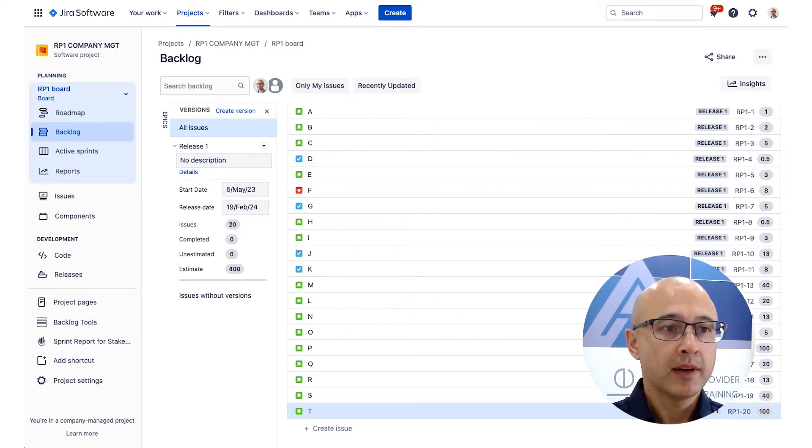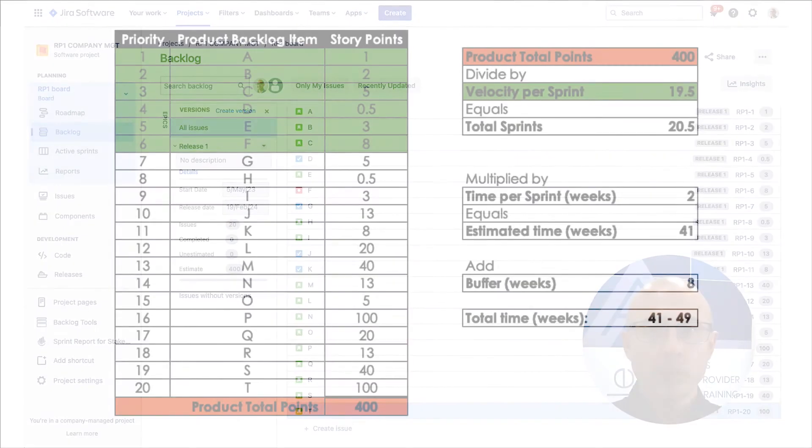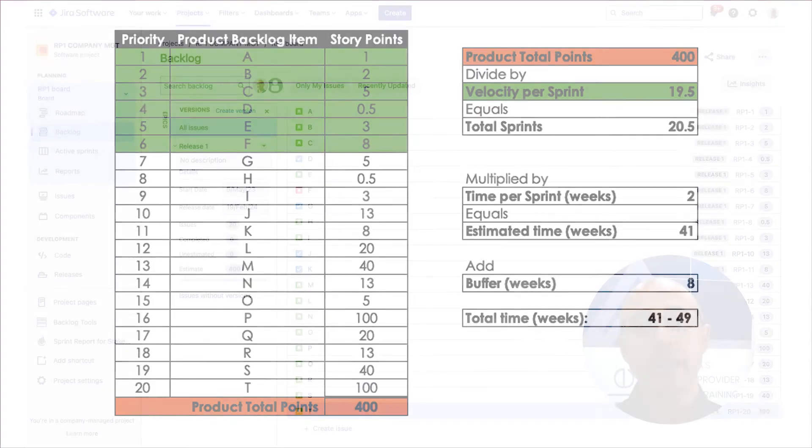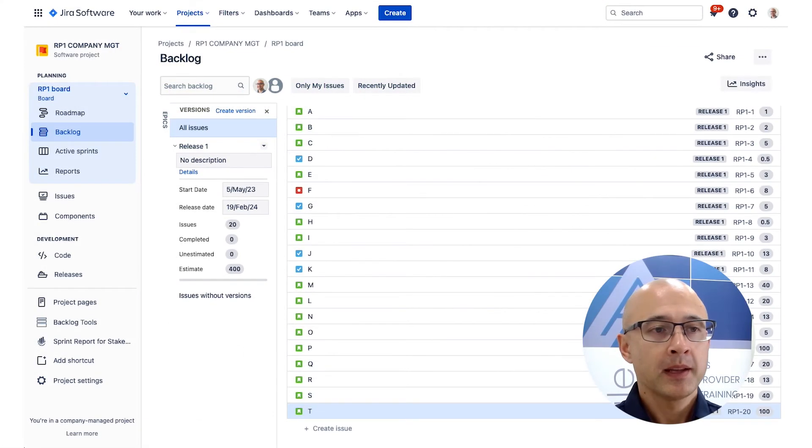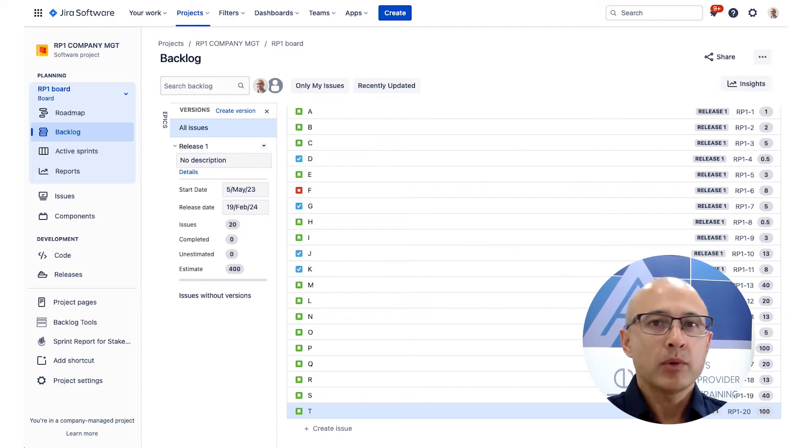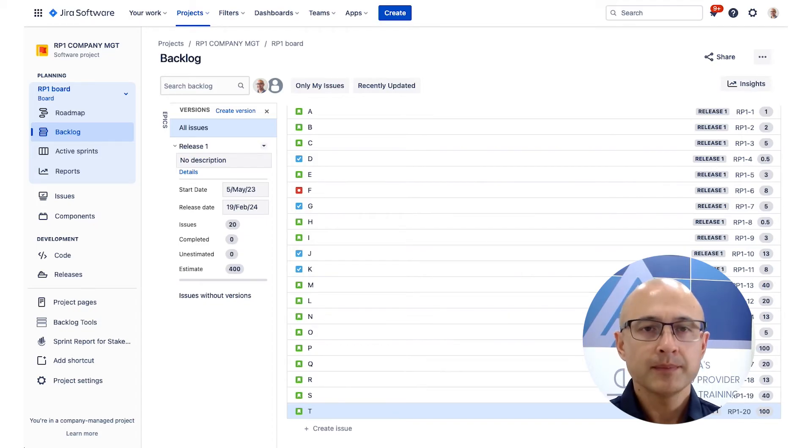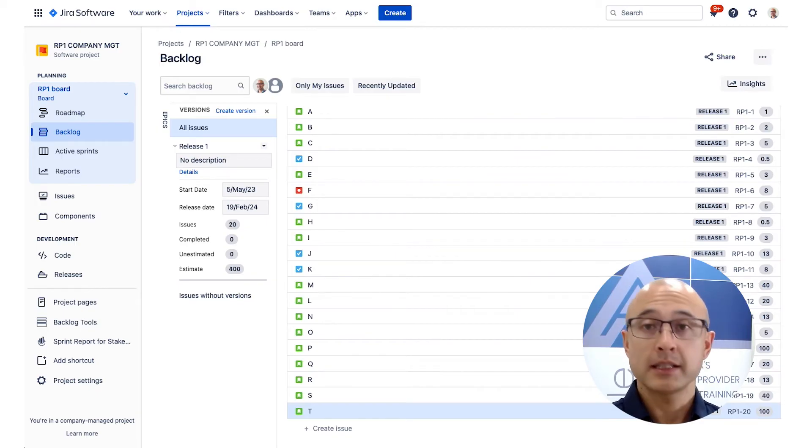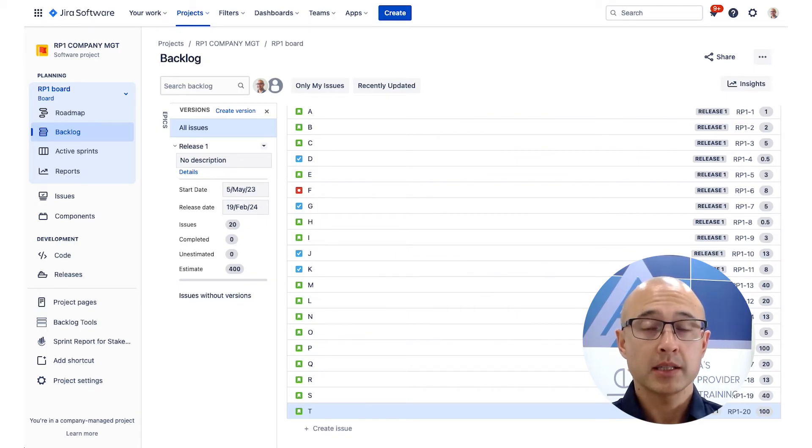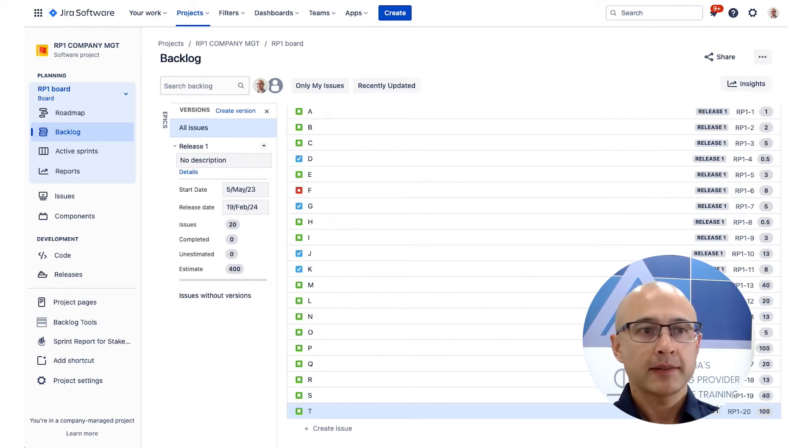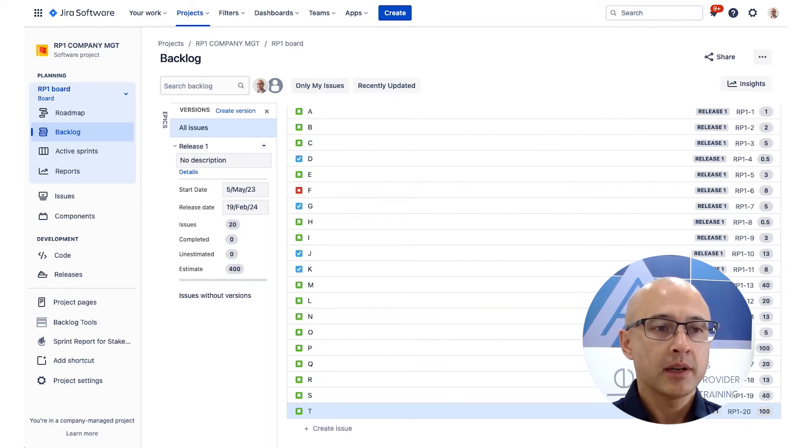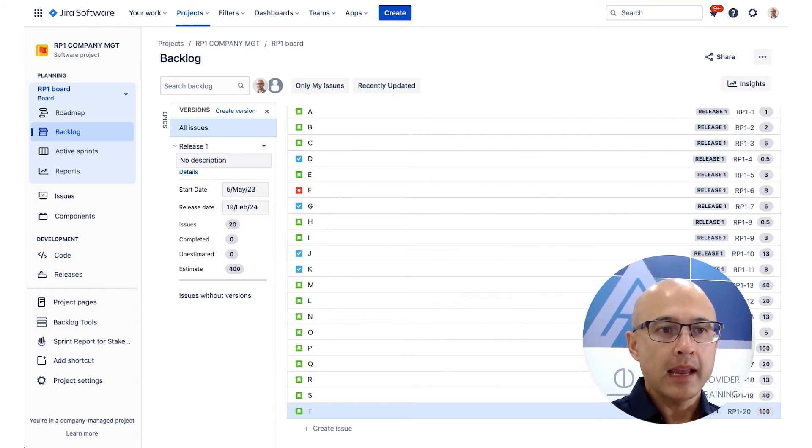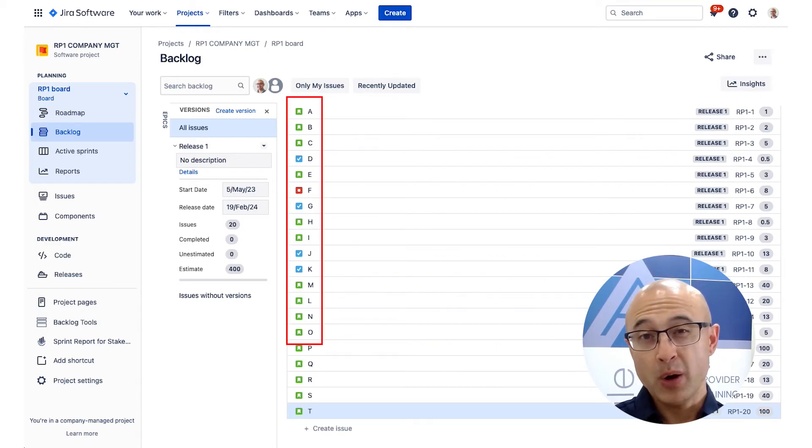So looking at my product backlog here again, it came out to be a total of 400 points. And remember, based on the calculation, we forecasted it's probably going to be delivered somewhere between 41 to 49 weeks. Now, let's imagine our stakeholder is not happy about that. And instead, they would like us to deliver earlier. So we have a discussion with them and we decide to prioritize what is essential and what needs to go into this first release. Now, let's imagine that after that discussion, we decided that we would only deliver A through to O.